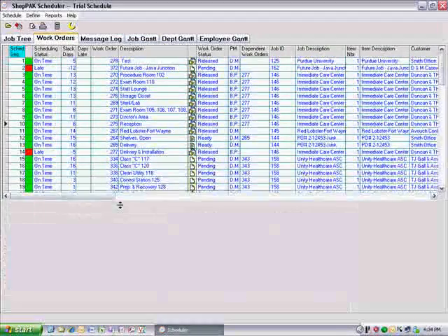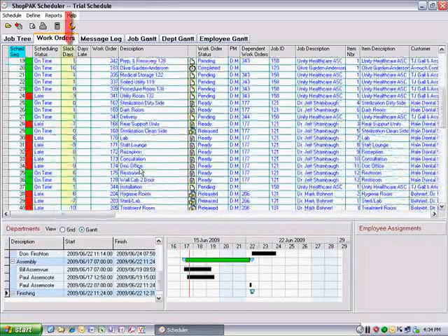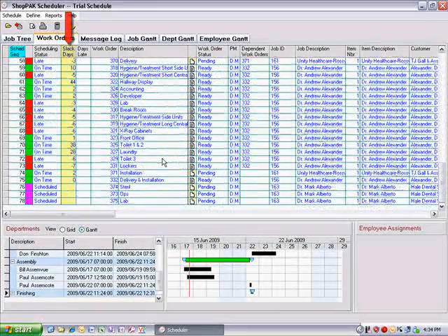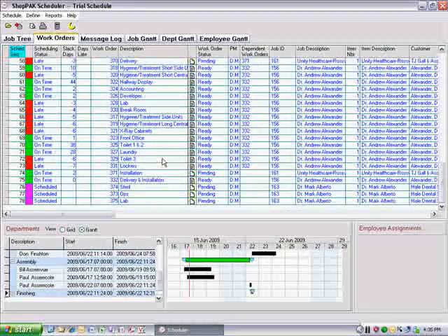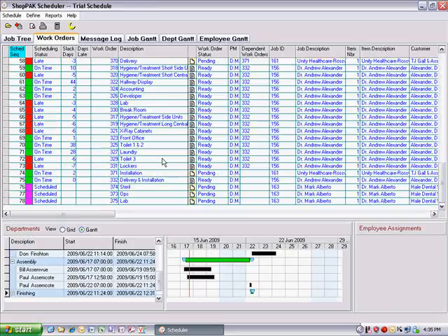By comparing scheduled finish with target finish, the scheduler calculates slack time. 0 or positive slack time means the task is on schedule and it displays green. A negative slack time or a scheduled finish date that is older than today means the task is late and it displays red. If you don't supply target finish, the scheduler can't determine if the task is late or on time. In this case, the status is set to scheduled and is displayed as a violet bar.